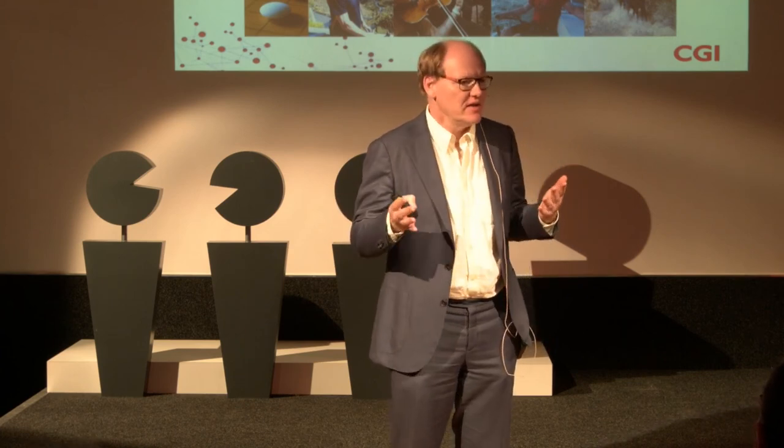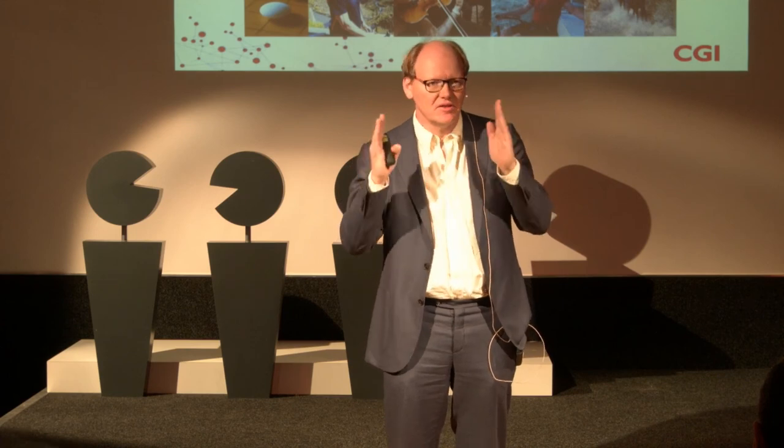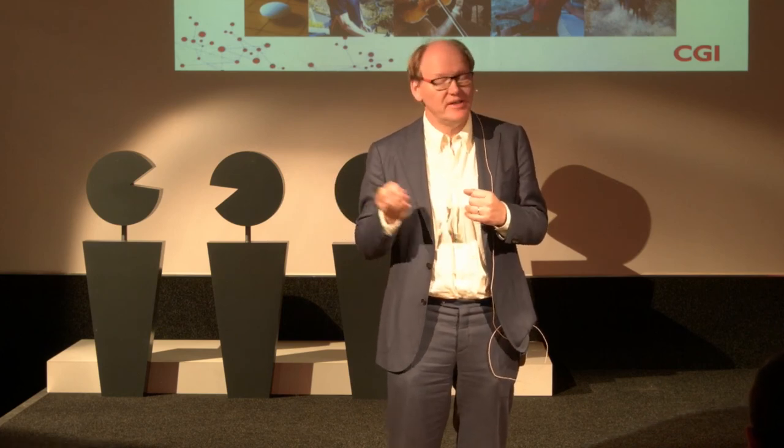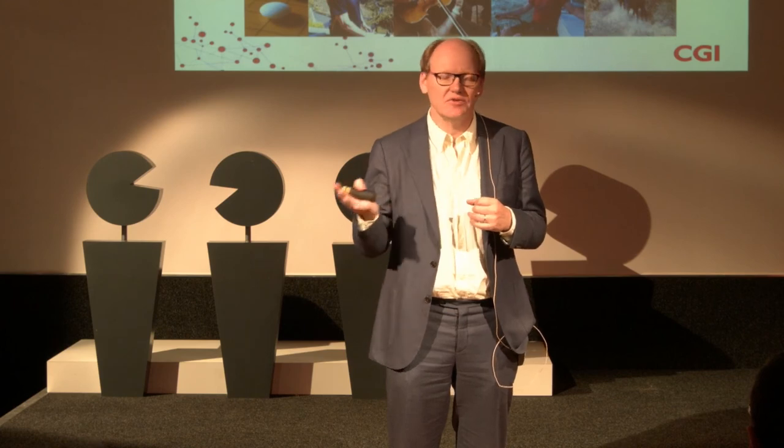And just before we actually commit to delivering these solutions or put a price tag on them, we know that the team has worked on this solution, and they have, by necessity, gotten into some kind of tunnel vision. They need to just look forward positively at the solution and develop it so that it can be offered. And that, of course, has a risk, because tunnel vision means that you ignore signals that distract you from your goal. To mitigate that risk, we have a process where these bids get reviewed just before we commit to them. And it's been my job to set up that process in CGI in the Netherlands, and I've been doing these reviews for years now.